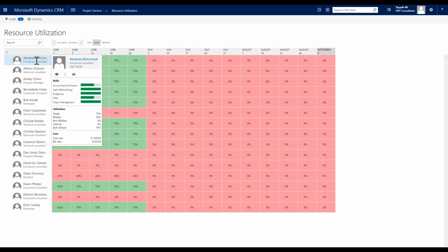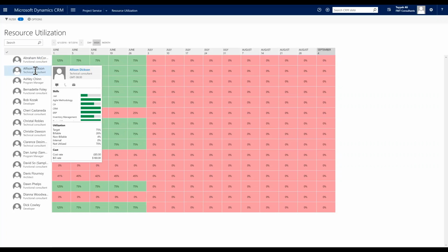And then I have my bill rate, which is what's going to actually be used to deliver that quote. So I can say that if somebody, for example, is utilized for 10 hours and I'm billing for $150, that's going to be $1,500 applied to the quote. In this way, we can be very granular, very specific, and also we're able to be protected, and we're able to protect our customers.